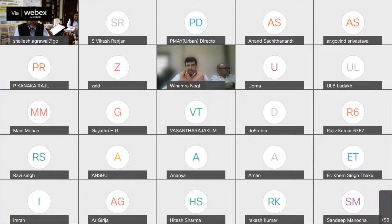Okay, Jignashu, again, I think you have answered what should be the way out for small magnitude works. Sir, for a small magnitude work, if we require cost effectiveness, then we need to use the panels 100 to 150 times, and then the cost will be equal to the conventional cost. If you want to save, you can increase the use.